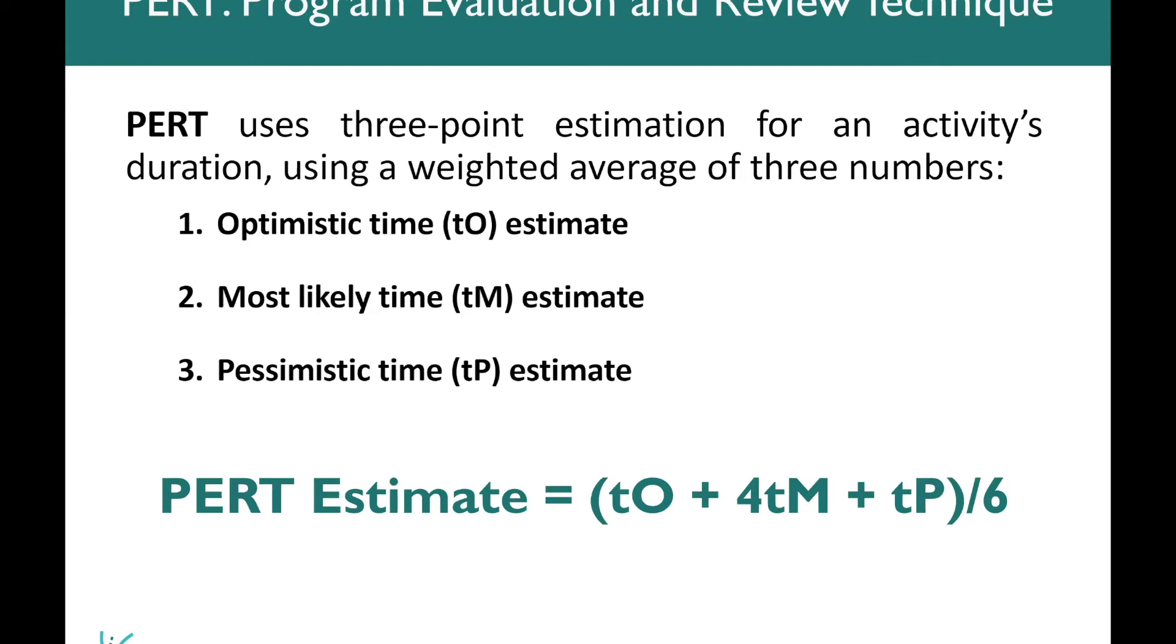Here's the PERT formula. The way that it works, you take the most optimistic time, you add it to the most likely time, which is weighted by four, and you add that to the most pessimistic time. And then you calculate that number and divide it by six. This equals your PERT estimate.